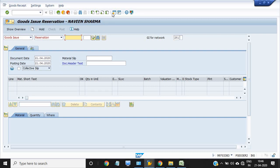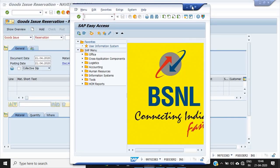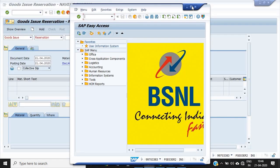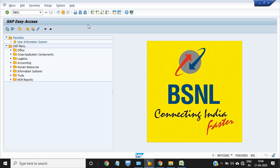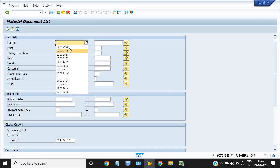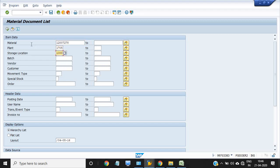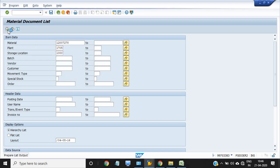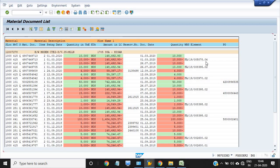The transaction MB51 is another transaction to check the stock. This is the material code, this is the plant, this is the SLOC 1000. Just check, see this is the WBS number for which I want to do the 281 movement type.